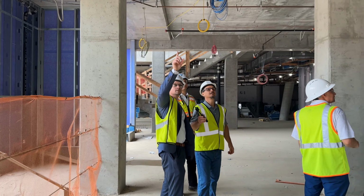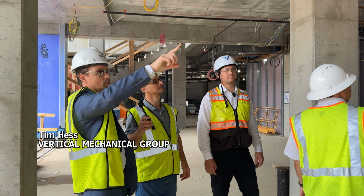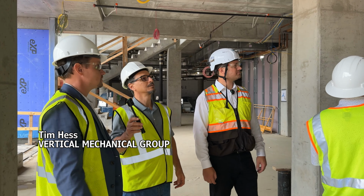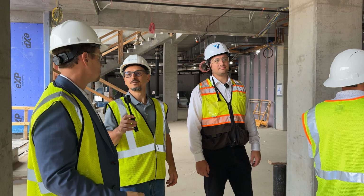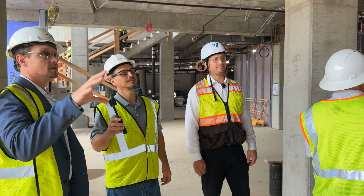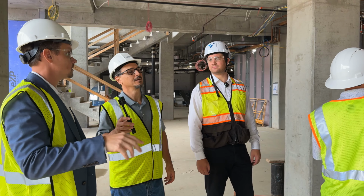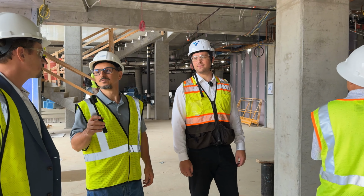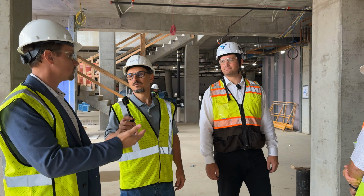All the ductwork? So we manufacture all those in our Berryville site. So we do all of the sheet metal in-house. So it helps with speed. We can manage the ordering. We don't have to deal with subcontractors on a day-to-day basis on trying to get all this in. So we can manage all of the ductwork going in ourselves versus trying to go out to a third party, right? That's great. It saves money too because we're doing it in-house versus markup on subcontractors and stuff.